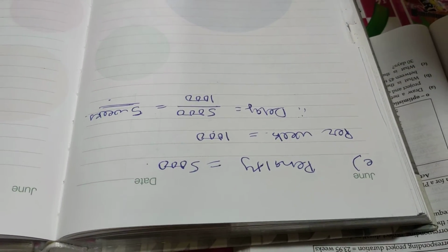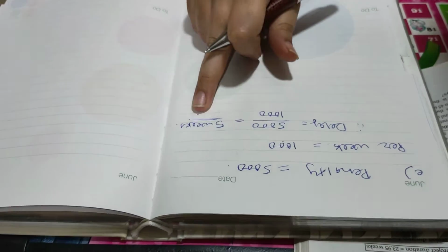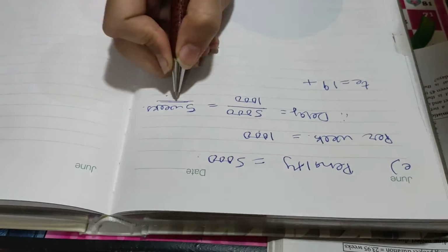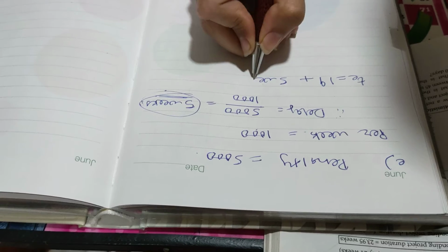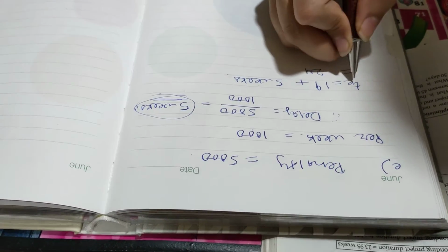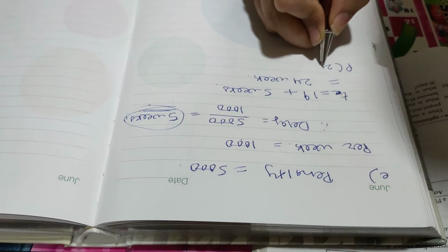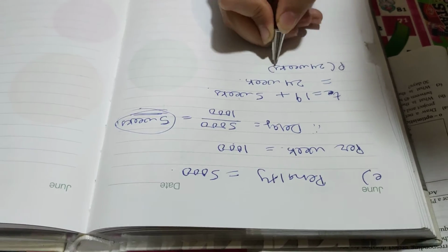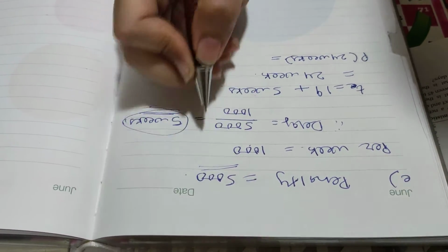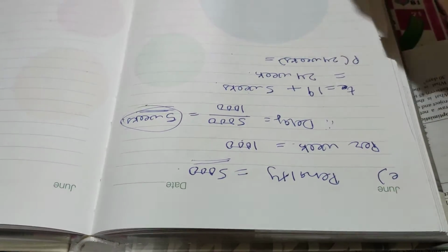जैसे पहले वाले क्वेश्चन में किया था non completion in 20 weeks, same way first we will find out for this. My expected time is 19 plus these 5 weeks, right? So it will come as 24 weeks. So first we will calculate the probability of 24 weeks. This means probability that it will get the penalty of 5000. वो समझ में आएगा, वहाँ से हम 1 को माइनस करेंगे तो we will come to know that probability is